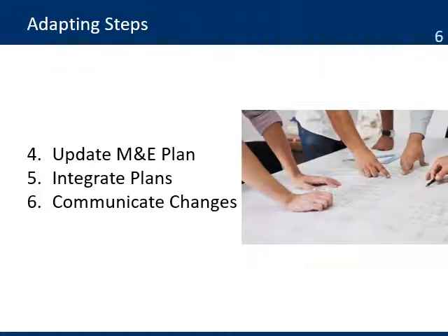As part of the changes, you will also need to update the monitoring and evaluation plans. Once those plans are updated, you make sure all plans are integrated and approved before releasing them to the team. The final step is to communicate the changes to all people that need to be informed.